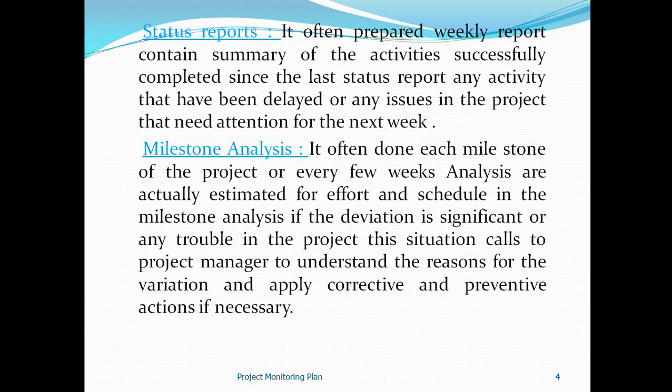The status report is prepared weekly, and it is a summary of the activities successfully completed since the last week or the last status report. Any activity that has been delayed, or any issues in the project that need attention in the next week.